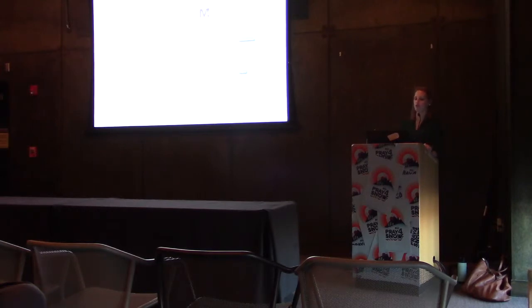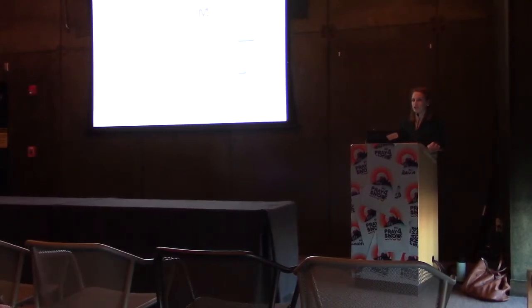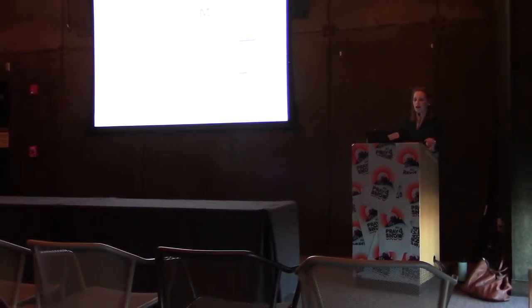A pretty brief overview of the DNR Public Waters permit submittal. Generally speaking, pretty much all the information that you need for your joint application is also going to go in here. The difference is the DNR has a handy online system now, and so all of their submittals go through the MPARD system. It's going to include, again, a lot of the same information: your purpose and need, your alternatives analysis, your minimization, maybe replacement if it's going to be required. And then you'll probably also have to include some sort of hydrology reports or modeling data for those.